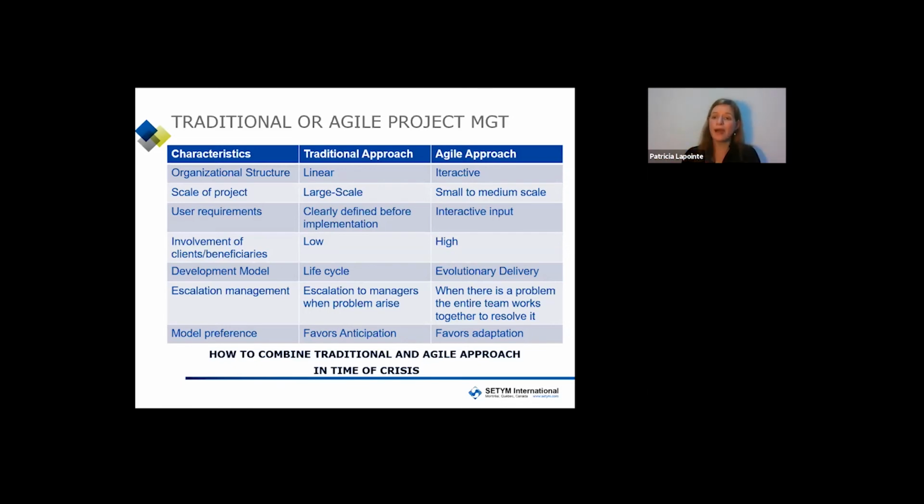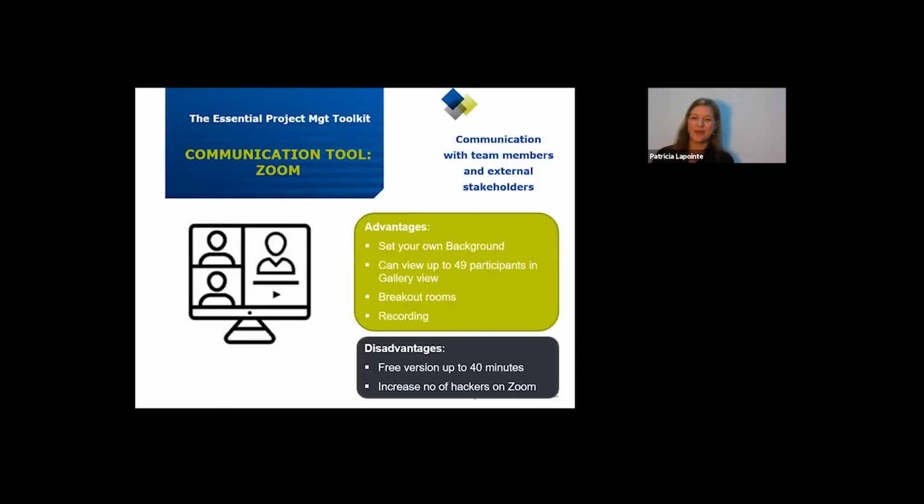You can combine some of the approaches, especially in time of crisis. So if you're not together with your team members, you could simplify some of your Gantt chart to what needs to be done into to do, doing, and done. All right, long explanation for this, but I hope everybody is still clear with me.